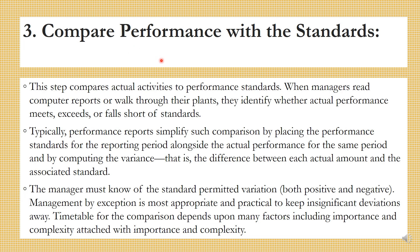Comparing the performance with these standards: once you have established standards and actual performance, you compare both. This step compares actual activities to performance standards. When managers read computer reports or walk through their plans, they identify whether actual performance meets, exceeds or falls short of standards. Typically, performance reports simplify such comparison by placing the performance standards alongside the actual performance for the same period and computing the variance — the difference between each actual amount and the associated standard. Management by exception is most appropriate and practical to keep insignificant deviations away.